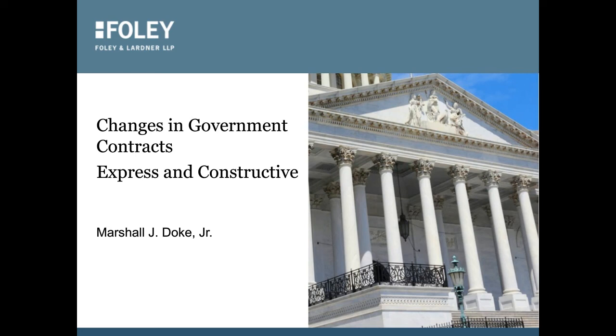Another area of constructive changes is interference with performance. Every contract has upon each party a duty of good faith and fair dealing. One result of this implied obligation is that the government may be liable for hindering performance of a government contract. In one case, the contractor alleged government interference by over-inspection and harassment by the government's engineer, who sometimes used harsh and vulgar language. The Board of Contract Appeals said, however, that if harsh and vulgar words are sometimes a constructive contract breach, no building would be constructed in our lifetime because the parties would be too busy litigating breach claims.